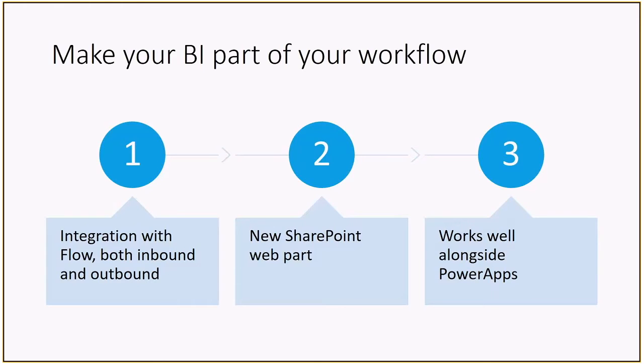And so what we're seeing now is integration with Microsoft Flow, for example, where I can define a specific type of visual, like a card visual or KPI visual. I can attach a trigger to it: if this goes over a certain number or under a certain number, have it basically self-escalate. If it goes over, kick off this workflow, and this workflow will then start the escalation process. And a human didn't have to be involved in this process. Part of this could be writing records into a SharePoint list, sending text messages to the PM, alerting an AD group. I mean, the sky's the limit here.